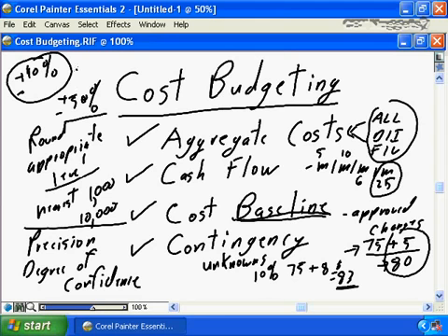So when presenting project budget information, make sure that you're presenting your precision level or degree of confidence. Yes, I'm telling you my project is going to be $83,000, but that's plus or minus 50%. I'm not far enough into the project to be able to definitively tell you that the project is going to be $83,000. Every piece of information I have at hand right now tells me it's going to be $83,000, but there's a degree of confidence. I need more information. I need to be farther into my project to allow me to deliver a definitive statement for the project budget.